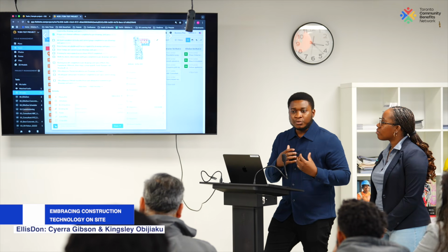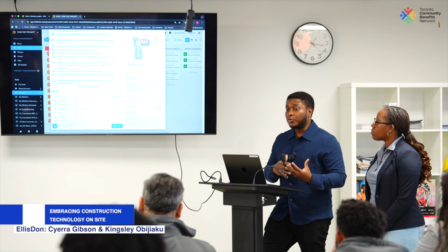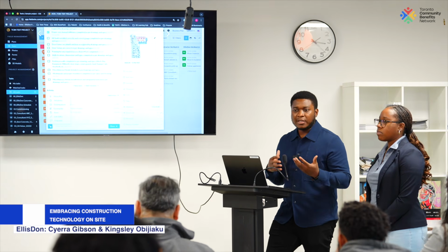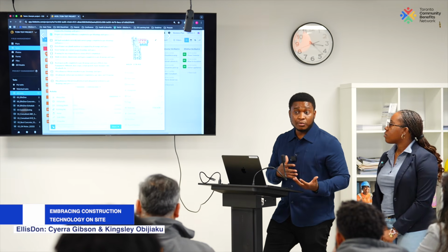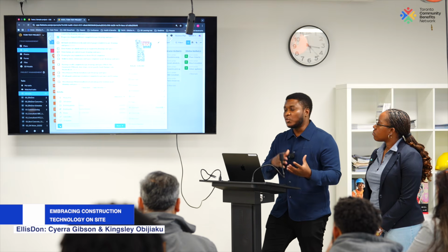It doesn't mean that I would not do the rework as a subcontractor. It just means that I have proof to say I'm not responsible for this. And you can do that work, but it's time and material, right? Like you have to get paid and compensated for doing the work because it's not your fault that work wasn't done properly initially. The material was bad, or you left that work in a certain condition. And when you came like 2 weeks later, you're being told something else. You can easily come in here and have that discussion in a way where this wasn't possible a few years ago, right?